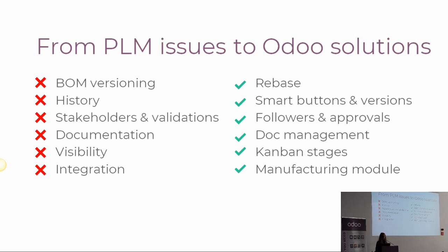You also easily warn the different followers of your change order. Just by sending them an email or logging a note, you can communicate with your colleagues, which is quite easy for the approvals, because if someone makes a comment, does not agree with the change you suggested, the next person who will come to approve will directly see the comment and know that they are validating the last version. So if some changes should take place or already took place since you asked them to validate, they will directly see them and validate the last version.